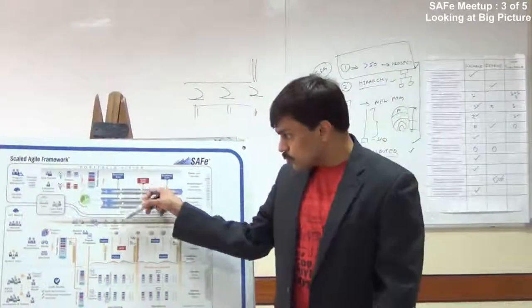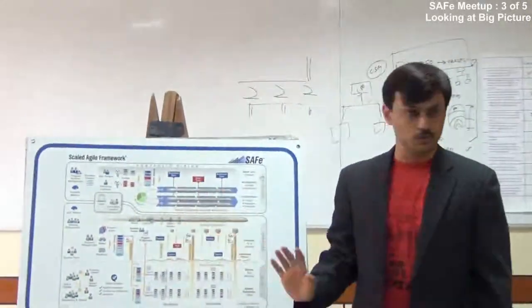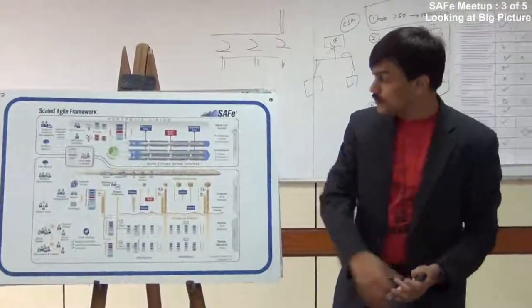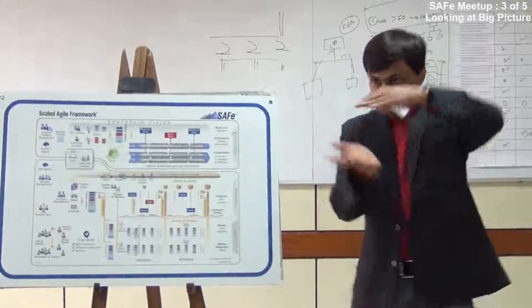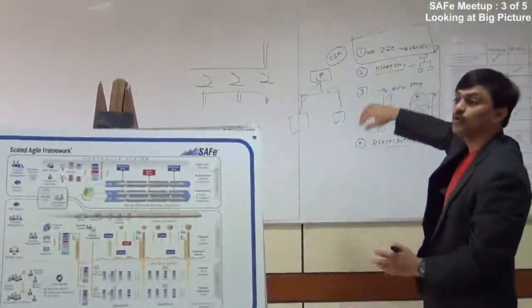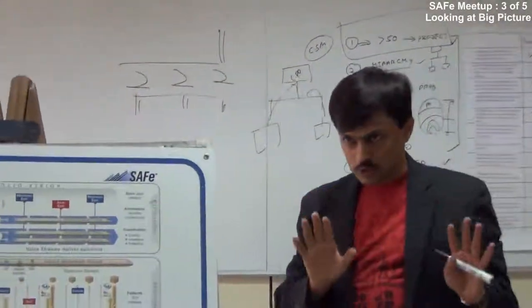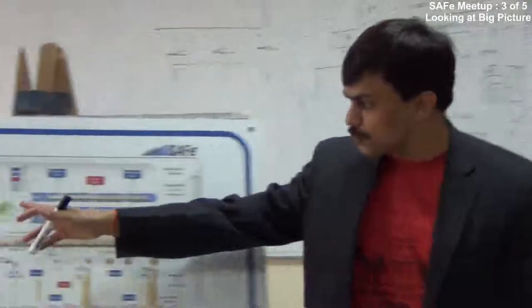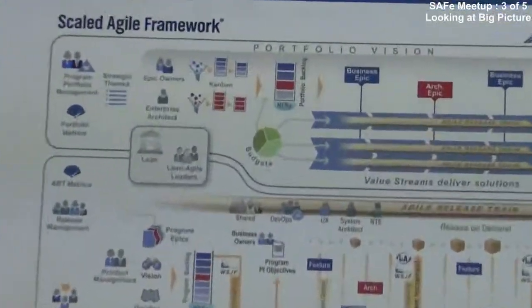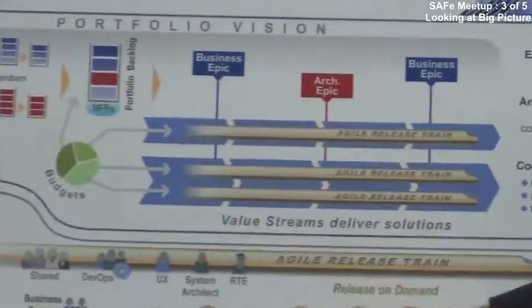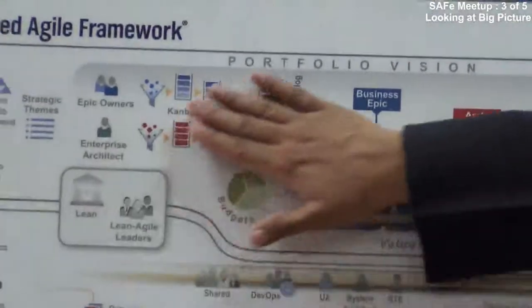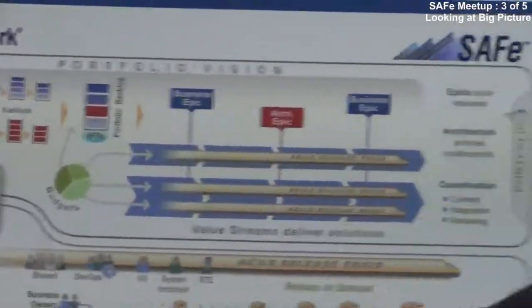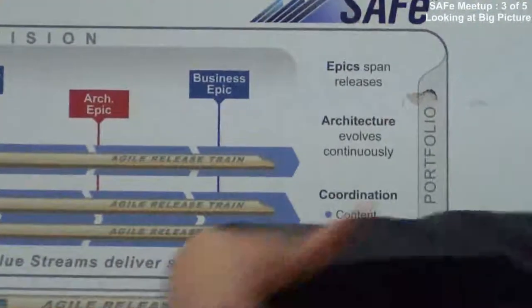According to the characteristics of various release trains, work gets allocated to them. Usually a business epic goes to only one train, but when the epic is big and divisions are separate, you may end up allocating one epic to multiple teams — a group of release trains — which makes the situation more complex. At the portfolio level, the decision is: this work is worth spending money on, we have this budget, these are our goals, this is our business case, let's allocate this train to it.